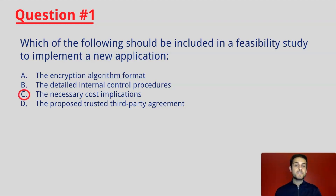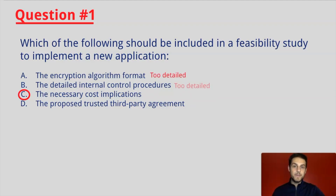If you selected C, you are correct. The answer is the necessary cost implications. Remember, a feasibility study or analysis typically includes general and necessary information. Choices A, B, and D are choices that would normally fit into a business case.